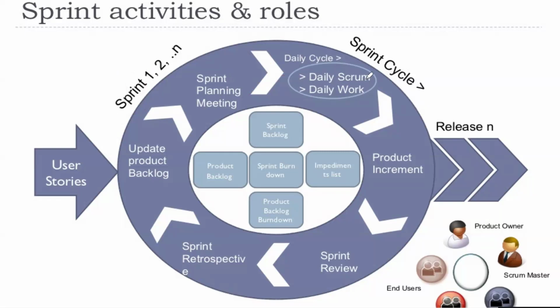Every day, a daily stand-up meeting will be happening. In the stand-up meeting, Scrum Master is going to be asking three questions. What did you do yesterday? You have to answer. Second question, what are you doing today?